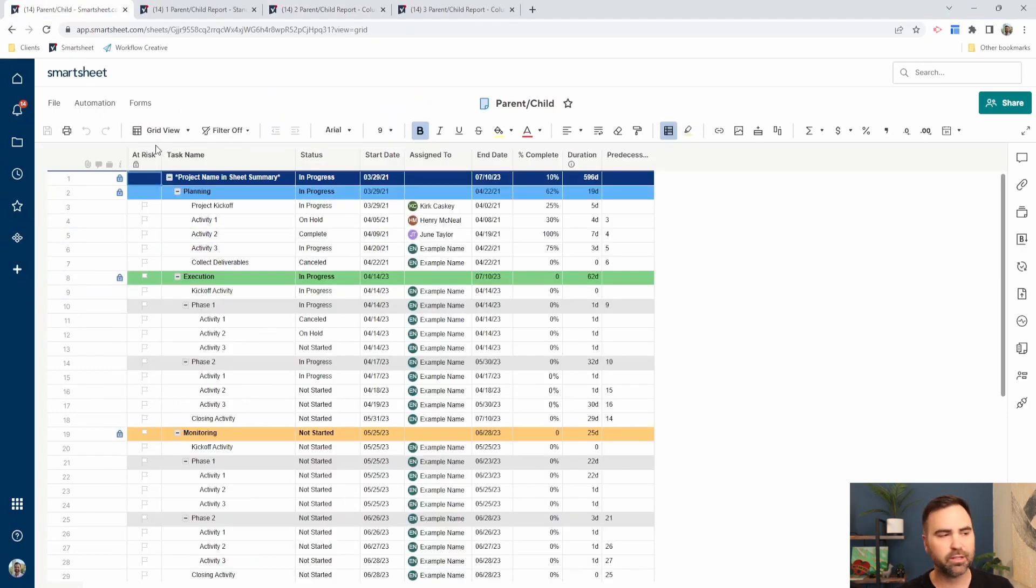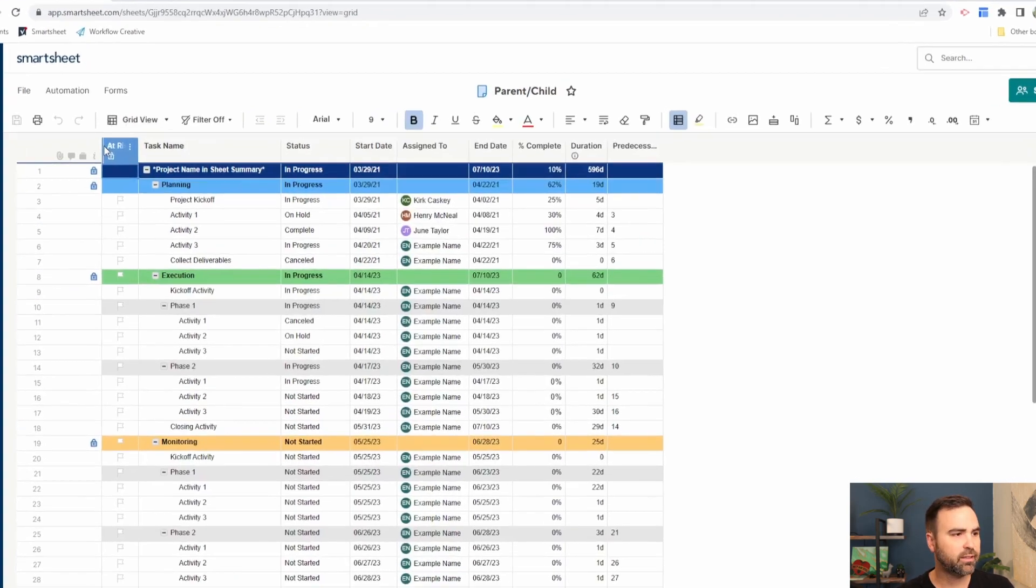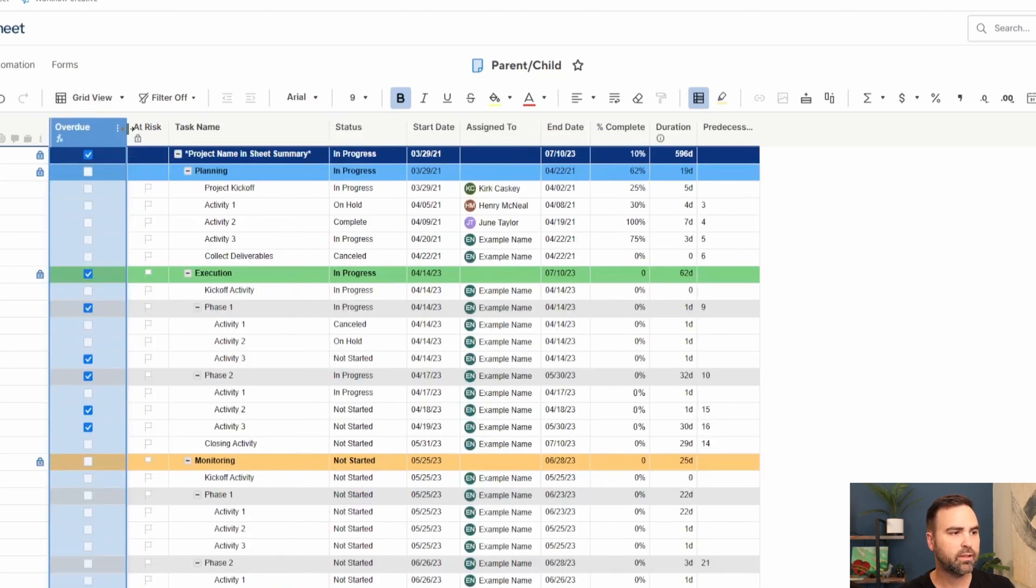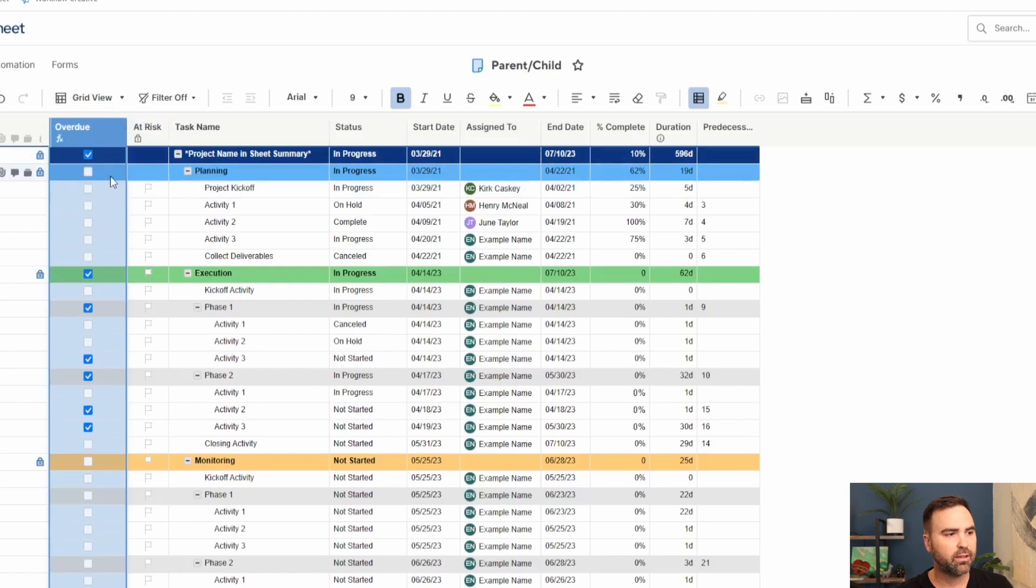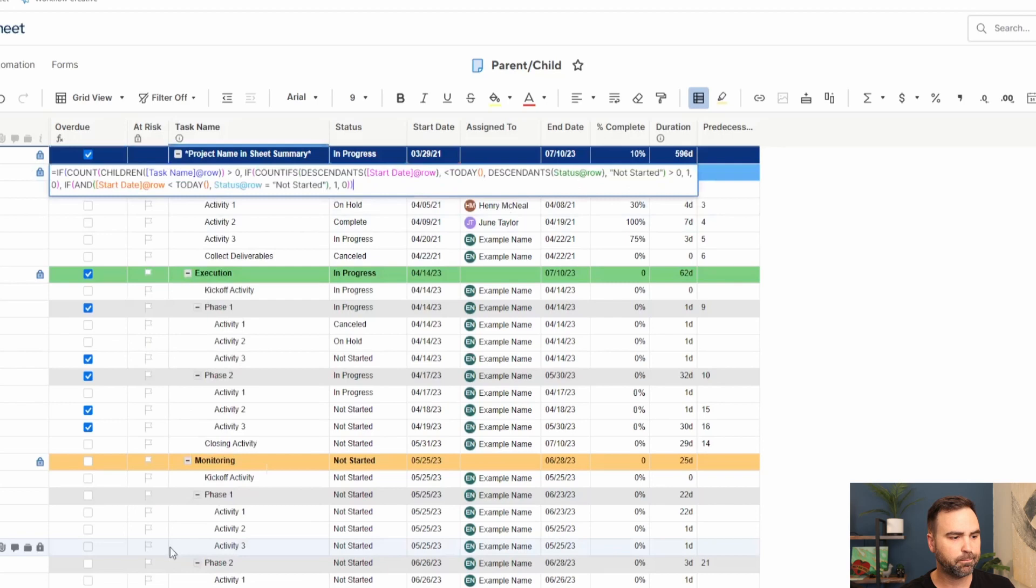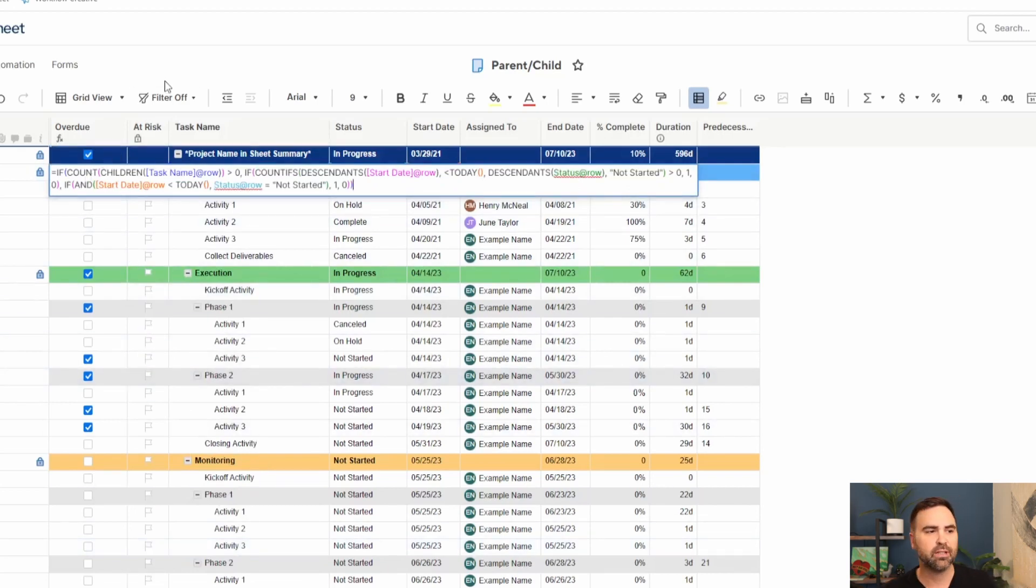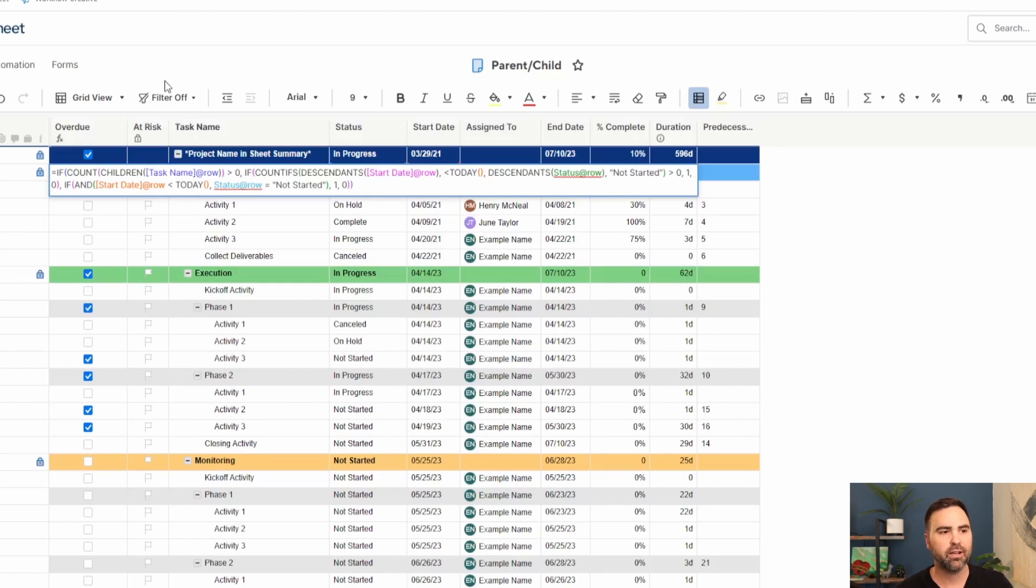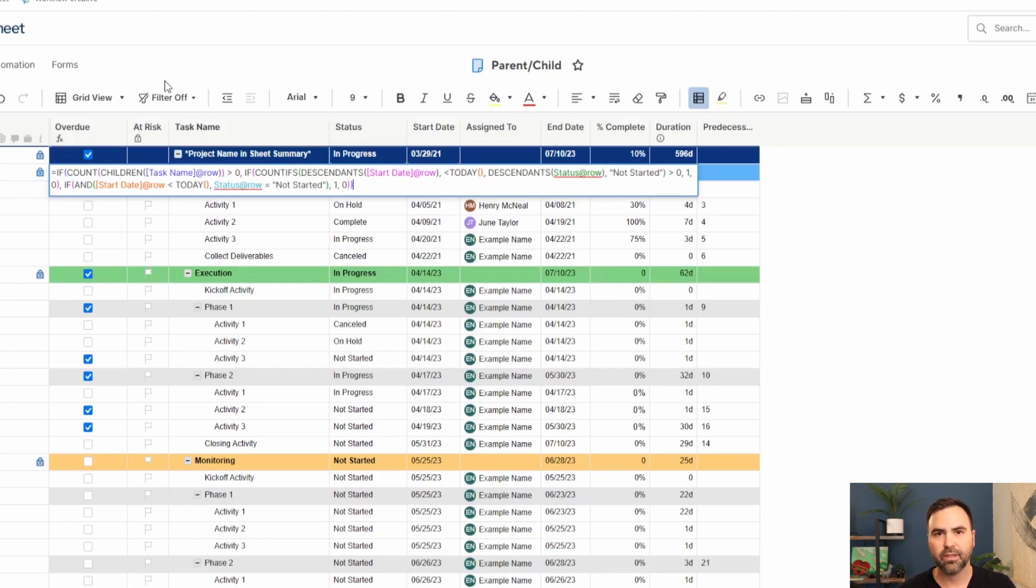If we go back to our sheet, there's a hidden column over here that I created that's called overdue. This column is a checkbox column and it has a simple formula in it where we're determining first whether the row that we're on is a parent row or not. If it is a parent row, then we want to count how many of its children have start dates that are in the past and have statuses equal to not started. If we're on a parent row that has children that fit that scenario, then it checks the box.